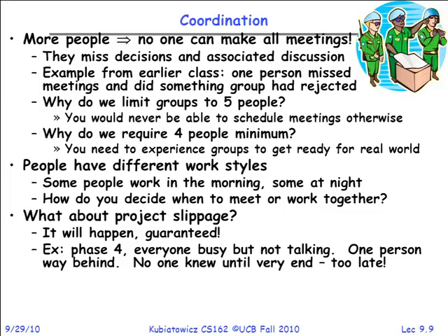Communicate. Talk often. Why is this under coordination right after communication? You've got to keep reevaluating. It's very easy in a group to fall into this: okay, we've got a week, we'll see you guys in 4 days, we'll find out what happens. Well, the problem is 4 days is probably too late. So you should plan on meeting a couple times a week to figure out what's going on. You could be very 2010s about it and have conference calls using your cell phones. I don't know, but try to have some communication much more frequently than twice a project.